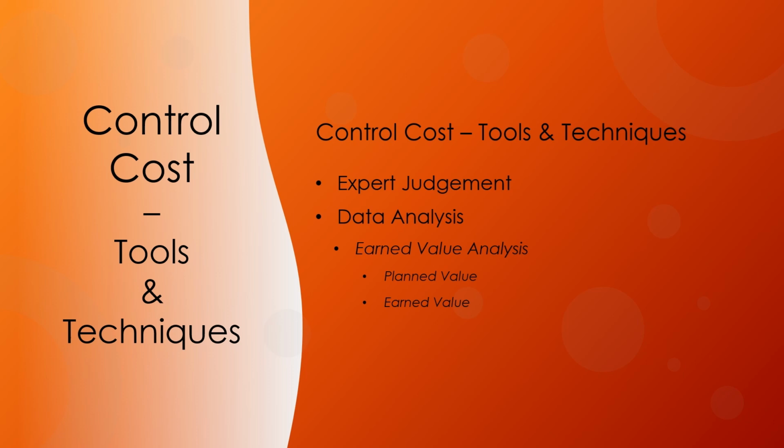Progress measurement criteria should be established for each WBS component to measure work in progress. Project managers monitor EV both incrementally to determine current status and cumulatively to determine the long-term performance trends.